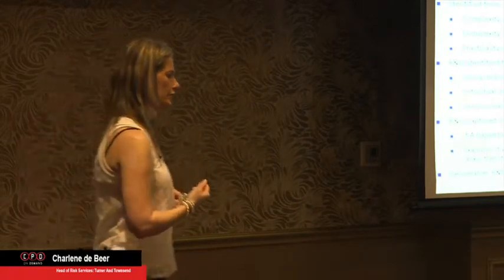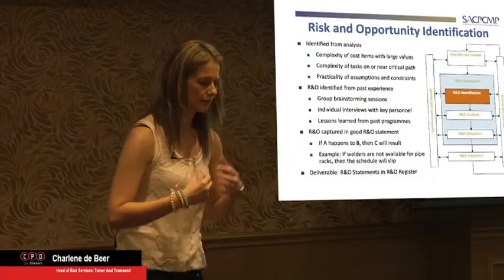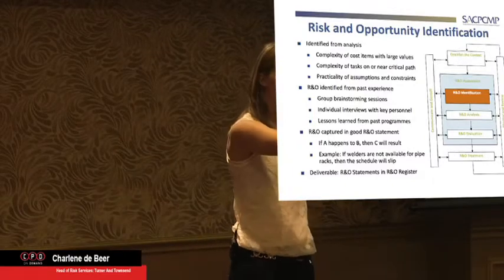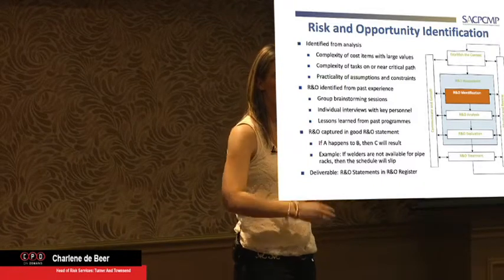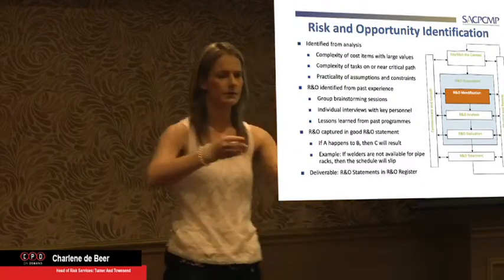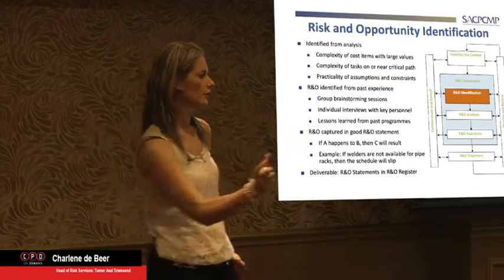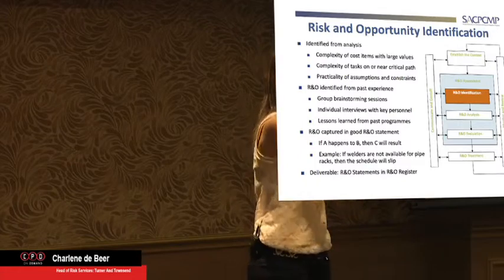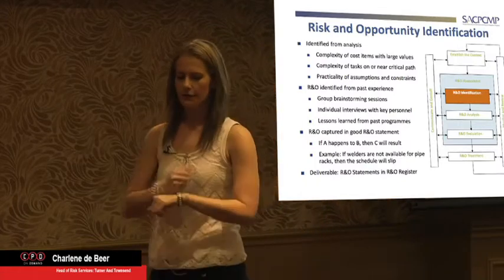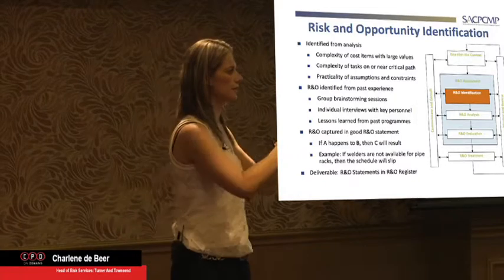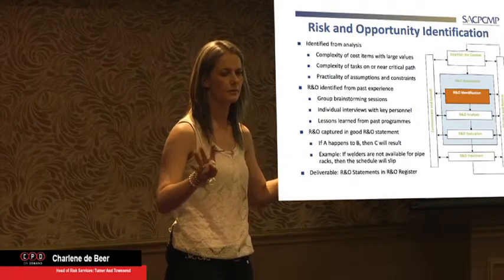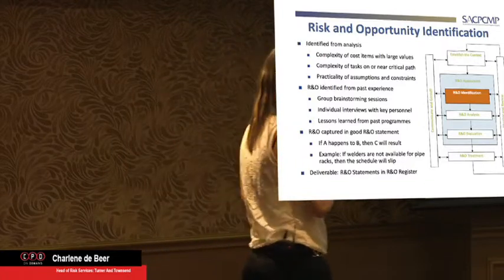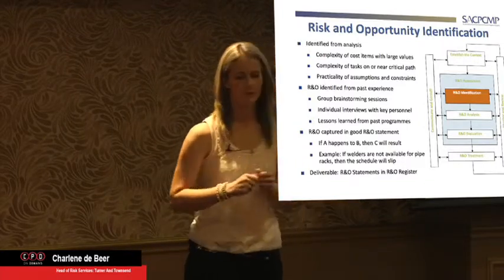So if you want to do a risk identification from scratch, what I would advise is I usually just draft up this A3 template. I give them the option of listing 3 risks. What's the risk, what's the cause, and what's the possible mitigation? We'll always add the consequence in the risk, so we don't look at that separately. I'll hand these out to the guys around the table, and I'll say, I'll give you 20 minutes. I want you to tell me what you think are the top 3 risks to this project. Whether it's cost, schedule, I don't want to know the consequence, I want to know what you think is the biggest risk on the project.